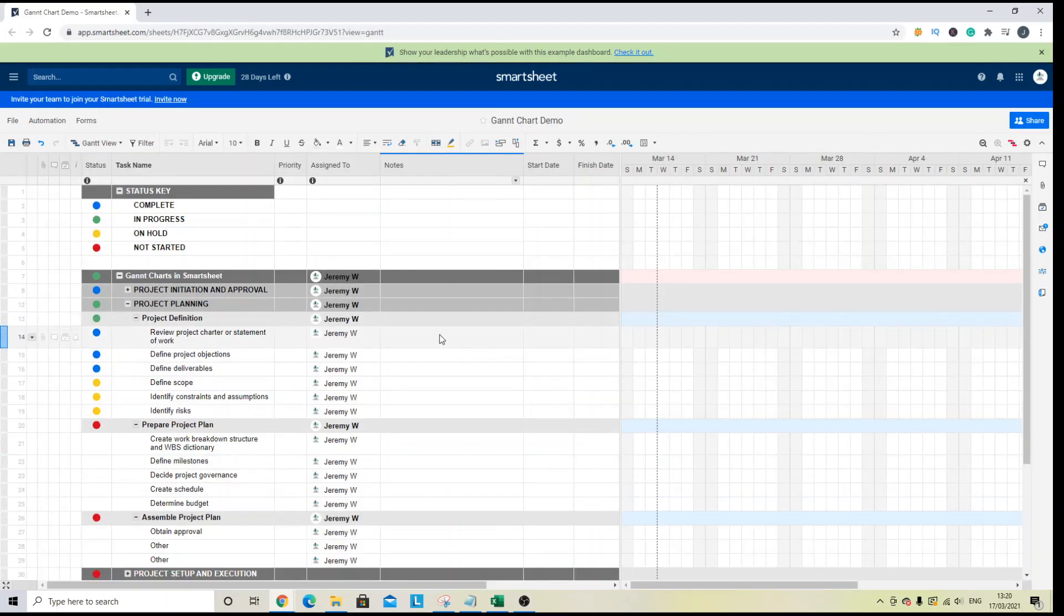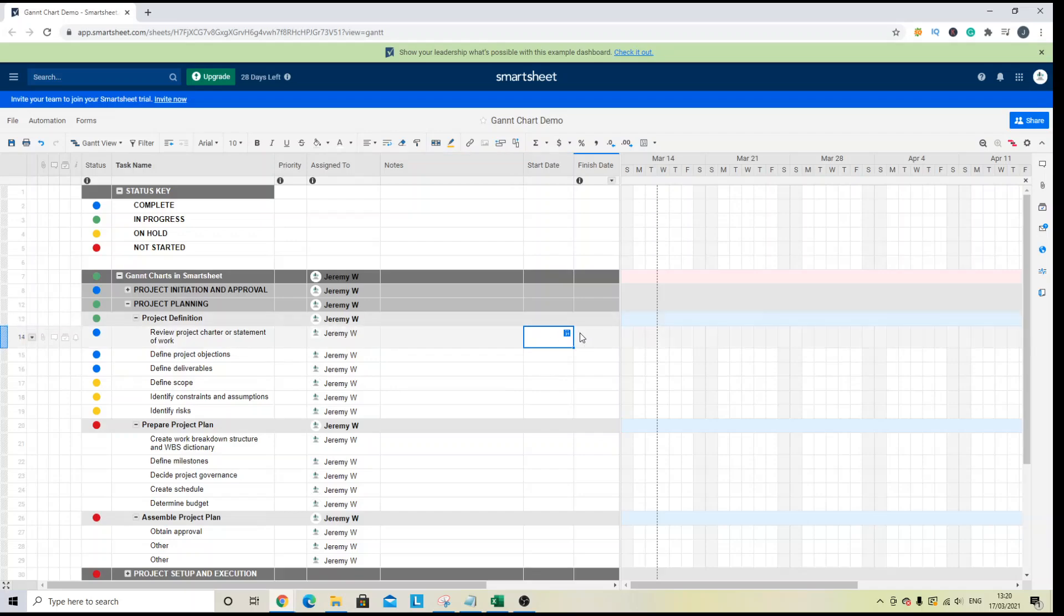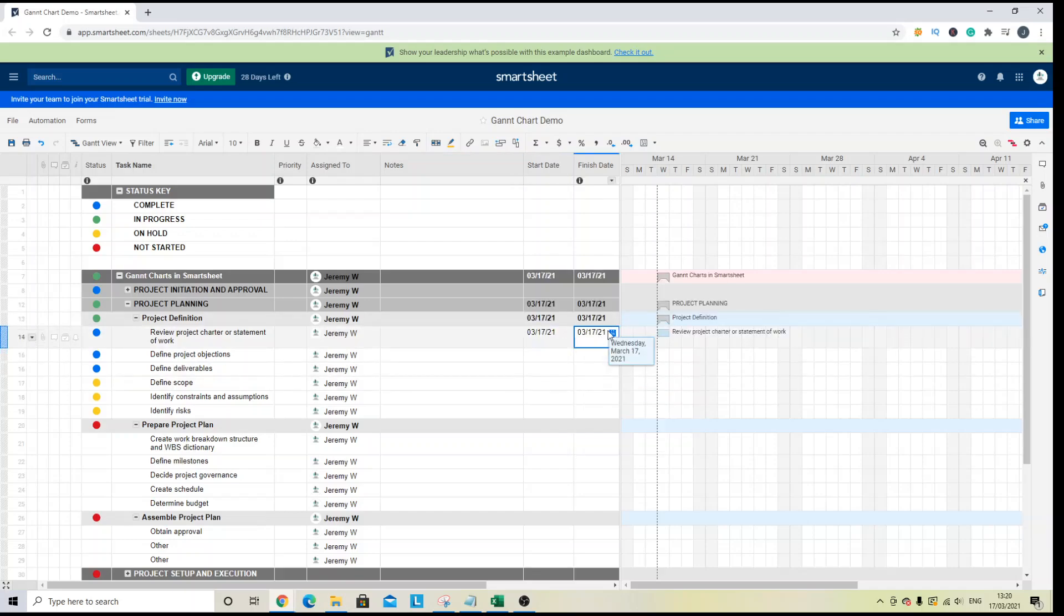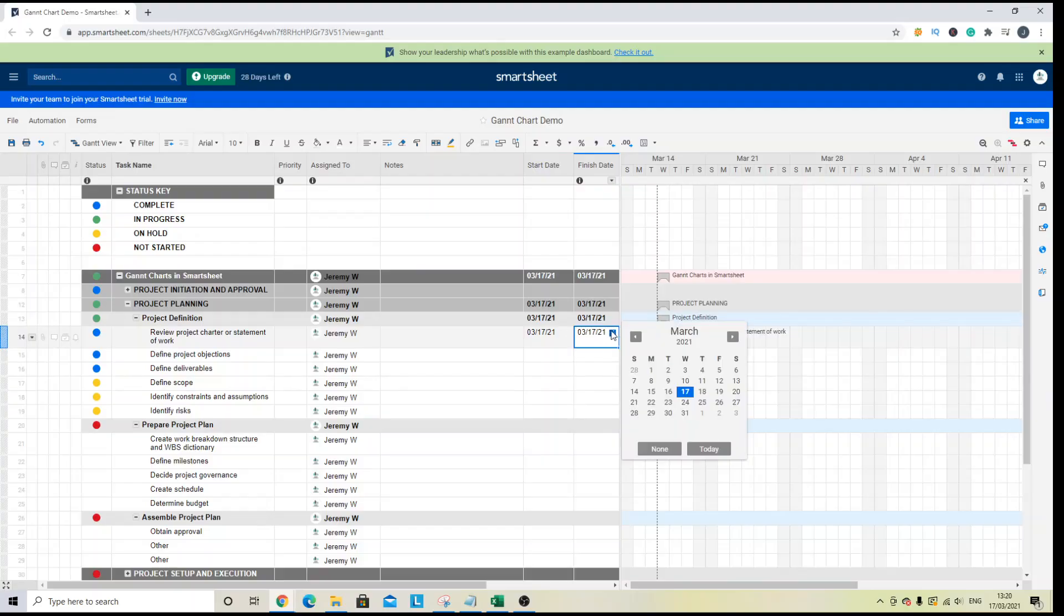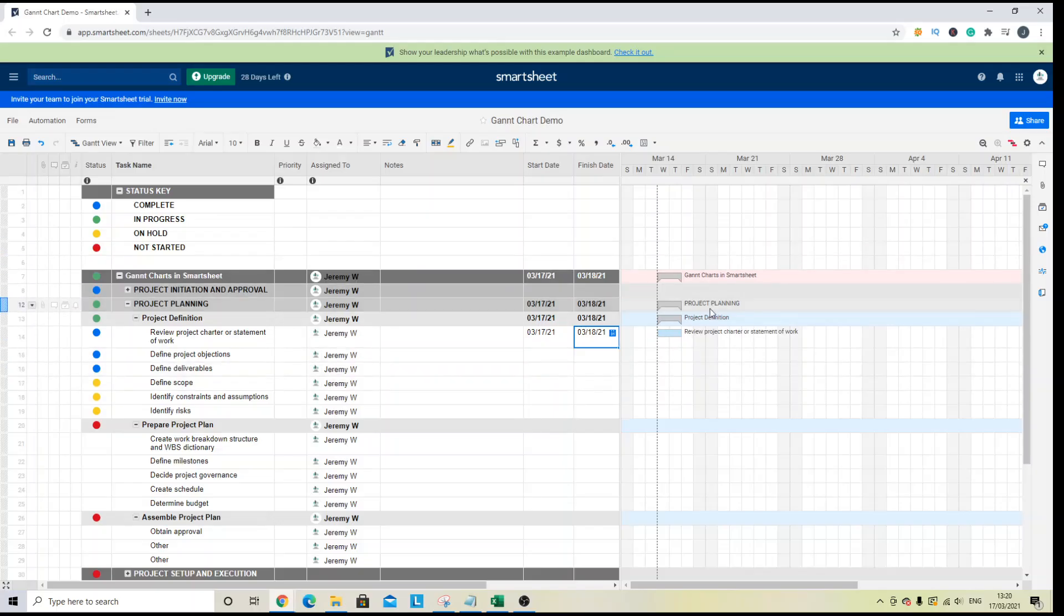Now I'm going to start to add some dates. So let's start with this subtask here and choose today's date. And I'm going to end it tomorrow. And you will see the Gantt chart start to populate. So the Gantt chart is fed from the date columns.